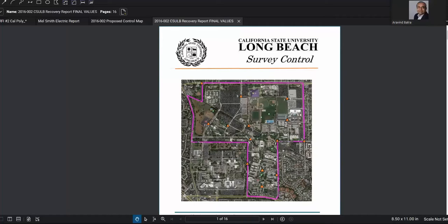Yeah, I think when it is exposed, if you can shoot the coordinates, that would be the best way to capture exactly the information on that particular utility. It is also the attributes that we've developed for each of the utilities, which indicate what material it is and what size of piping, depending on the type of utility. If you can gather all that information as well and feed it to us, we will update it on the attributes table. And the date it was installed.